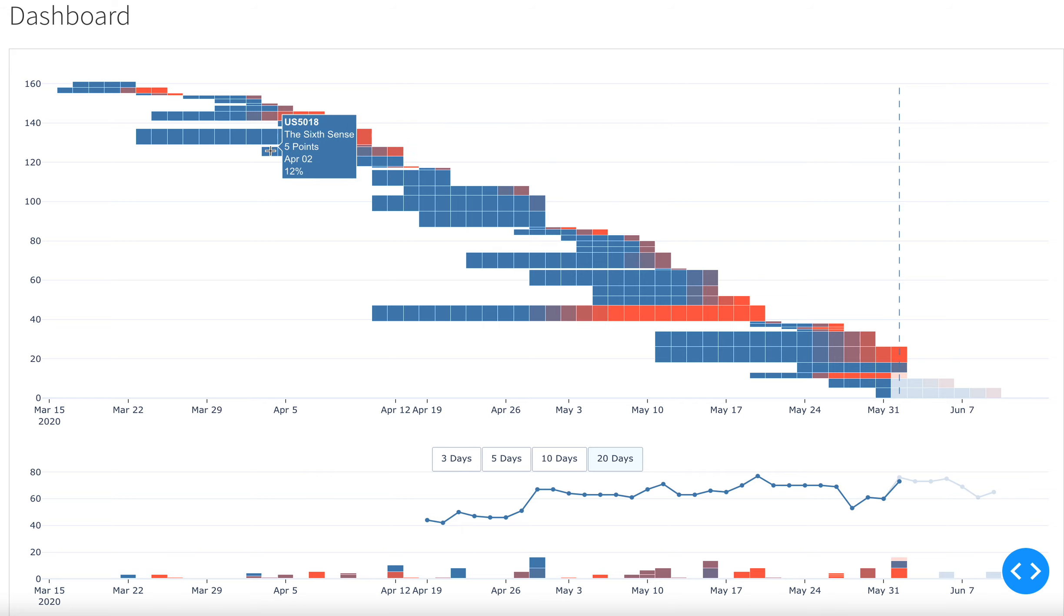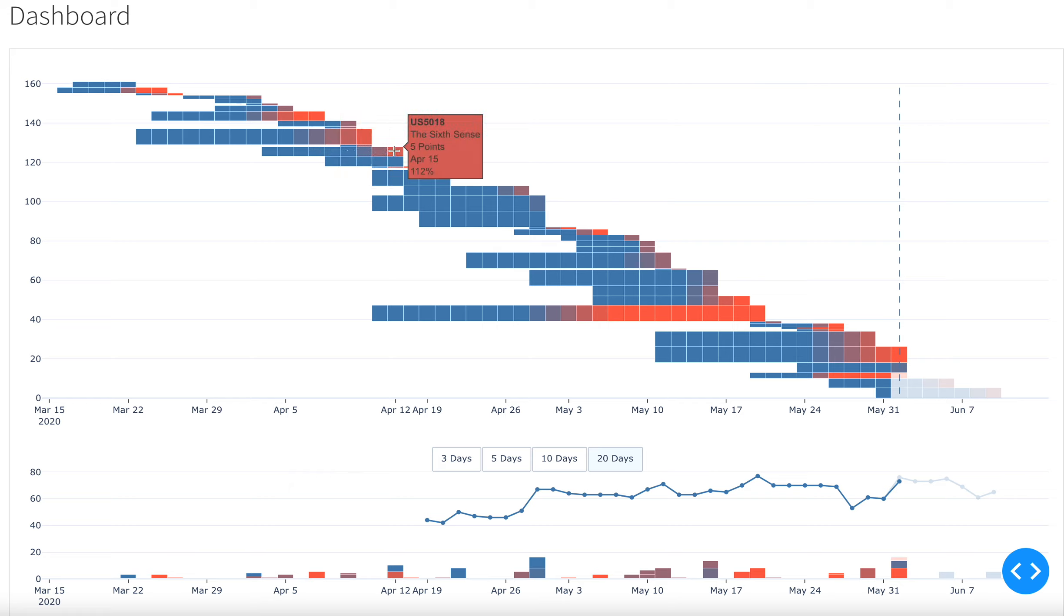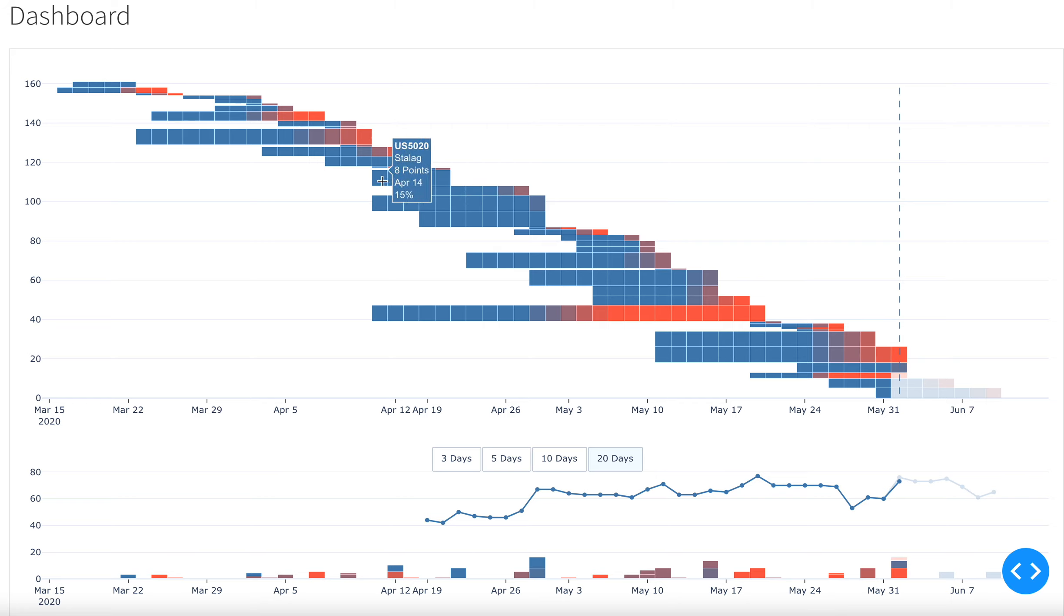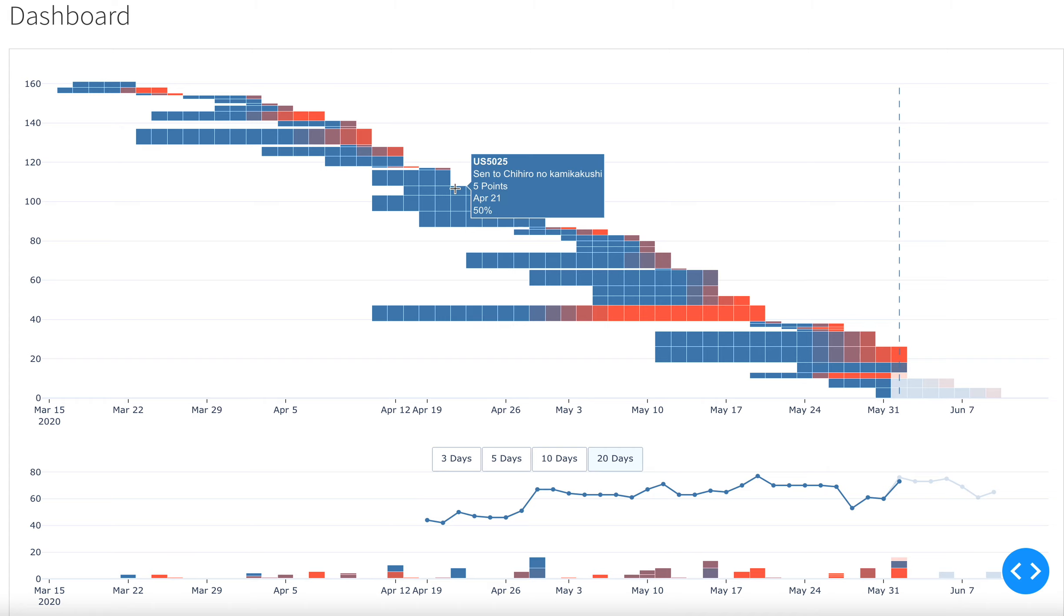Each horizontal bar here represents one story. Each rectangle here represents one workday. So in this case, for example, this was an eight-point story and this was completed in five days, five workdays.